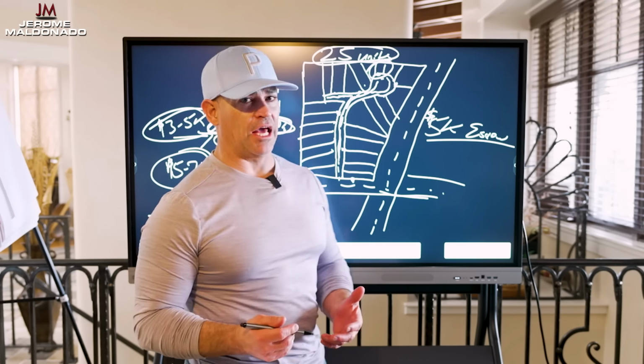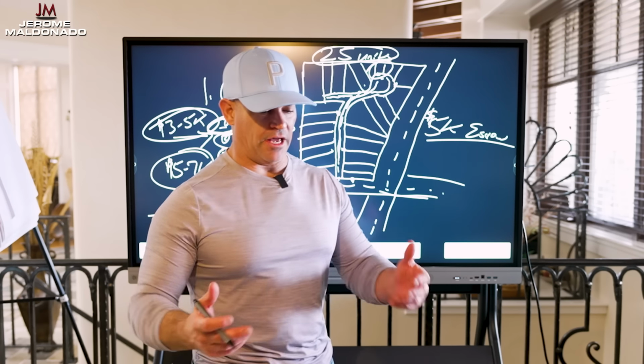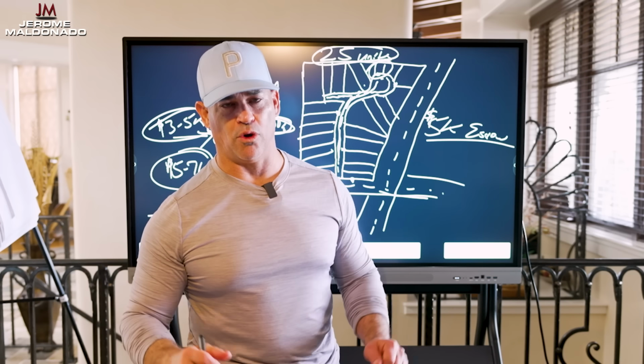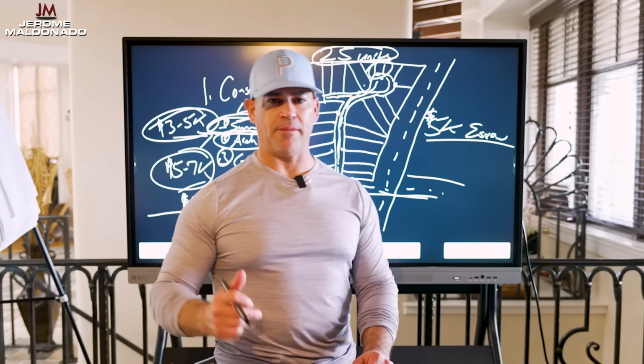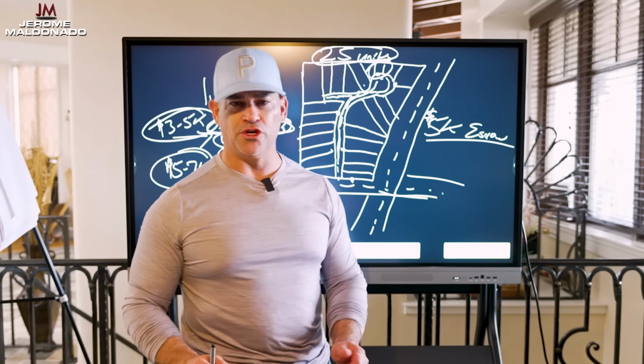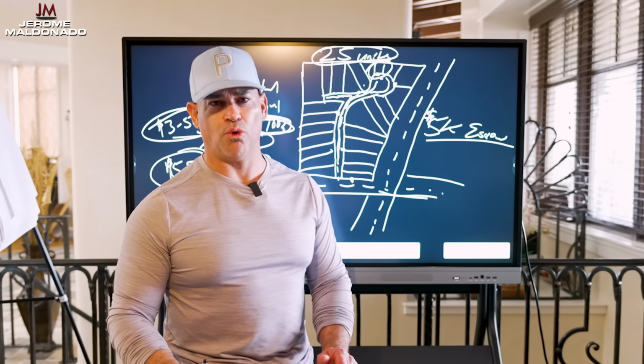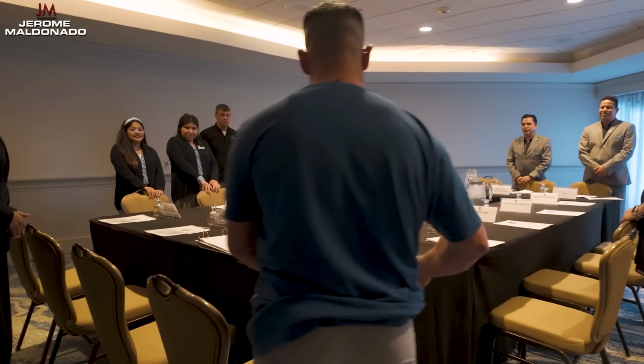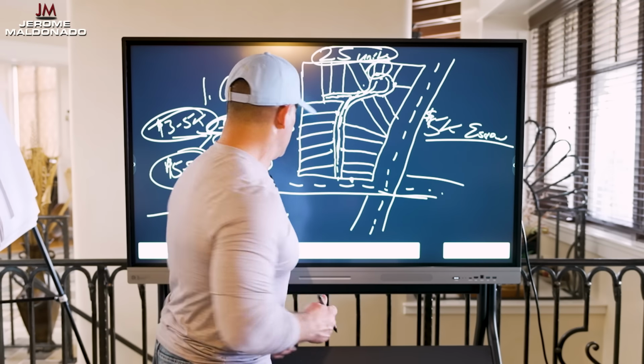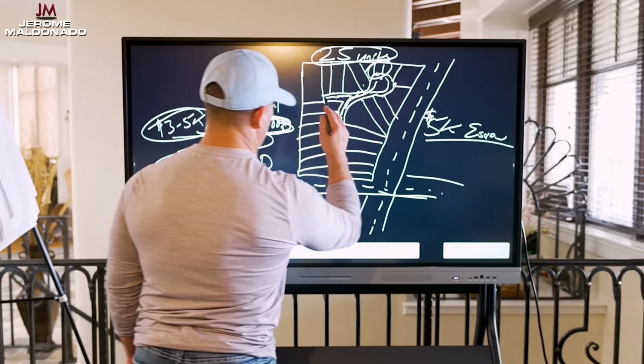Now, it sounds complicated, but it's not, because all these people go in, they have a roundhouse meeting, it gets distributed out to all these people, they stamp it, they come back with questions. Your architect and your engineer are the ones that answer 99% of these questions. Then it goes in for a public hearing. Once it goes in for a public hearing, the survey company is going to short plat all these lots.